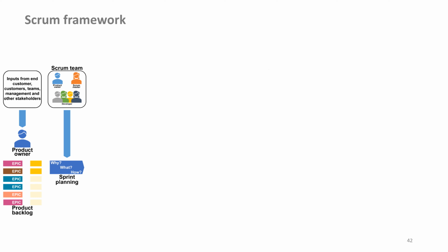You define a sprint goal, which is usually formulated abstractly, and then you select from the product backlog which functionalities have to be implemented to achieve this goal. You go through the product backlog from top to bottom. The sprint goal should be derived from the product backlog.